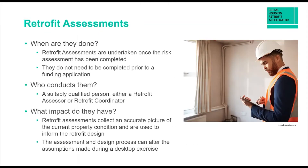Once you've done your risk assessment, you have an idea of what you might be proposing, but you don't necessarily have a detailed stock condition survey — that's essentially what retrofit assessments are. They're undertaken once the risk assessment has been completed and don't need to be done prior to a funding application; within wave one of SHDF there was no stipulation to have retrofit assessments completed for properties put forward. They're generally done by a retrofit assessor or retrofit coordinator — somebody who's gone through those qualifications and is suitably skilled for that region. Depending on the risk pathway, there are requirements around background skills for those assessors and coordinators, and they can have a major impact on your SHDF bid.